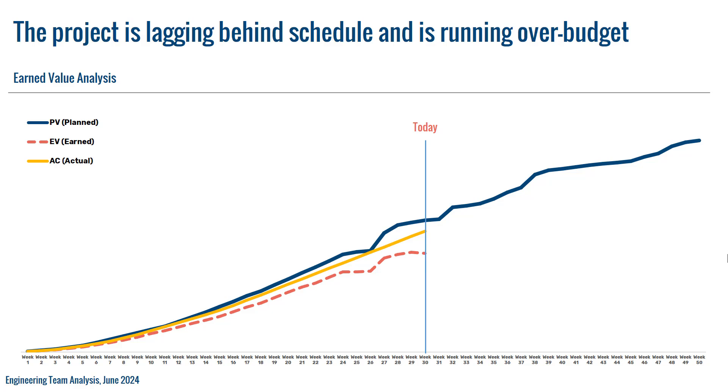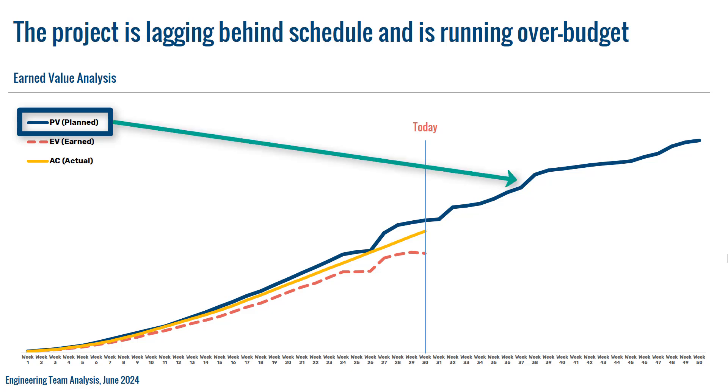Earned value analysis is a project management technique that measures project performance and progress in an objective manner. It integrates scope, schedule, and cost dimensions of a project to provide a comprehensive view of project status and performance. Here are some key components and concepts. Number one: Planned Value or PV, also known as budgeted cost of work scheduled. It represents the budgeted cost for the work planned to be done up to a specific point in time. It is essentially the approved budget assigned to scheduled work.